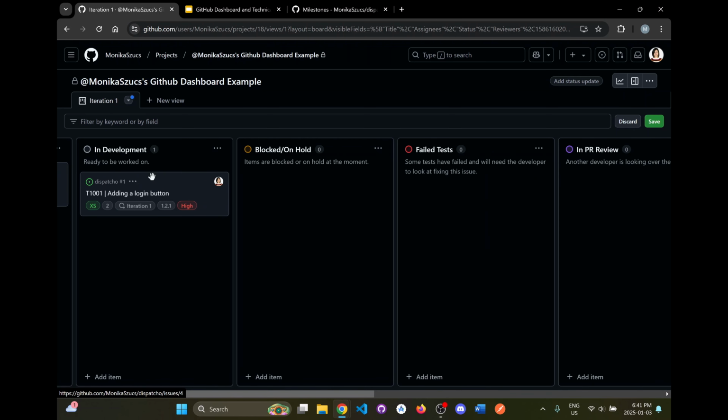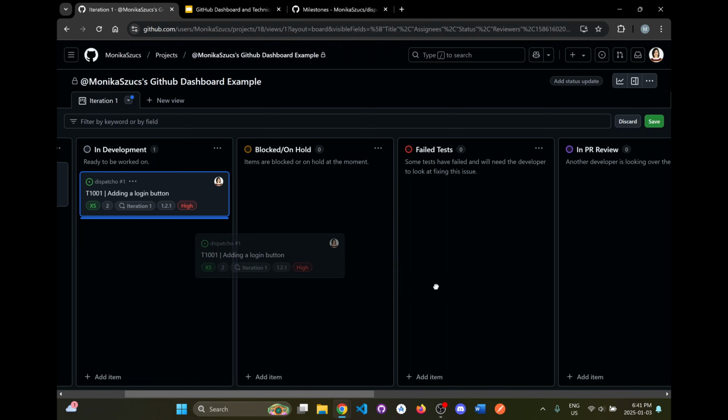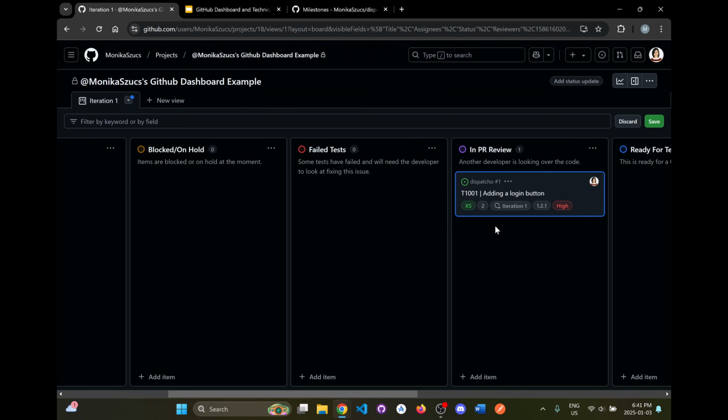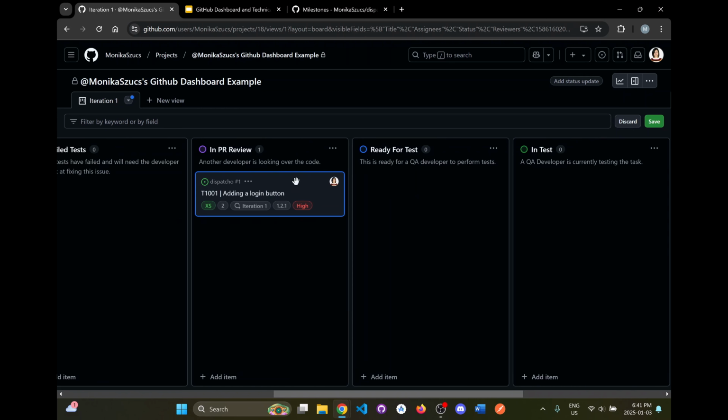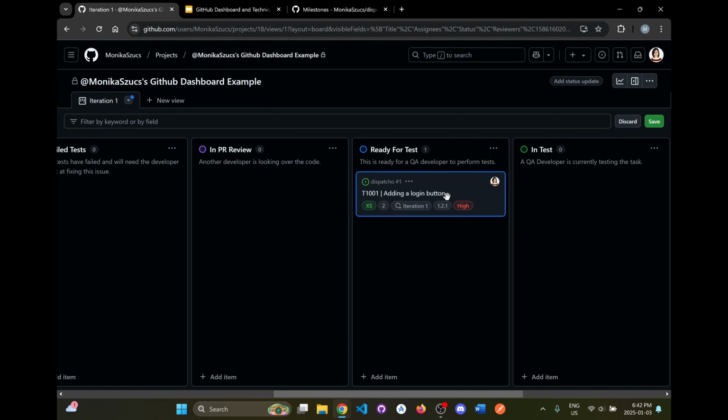And once you get over here in development, once someone's done the task, they'll put it into PR review. And this PR review, again, remember, is when someone else is looking over it. Usually you keep it as yourself still and not the reviewer, but just keep it as a developer. And once that reviewer, the person who's looking over that branch, that code that you've done, has approved everything and it looks good, then you would merge that code. And once you've done that, you can then move it over to ready for test.